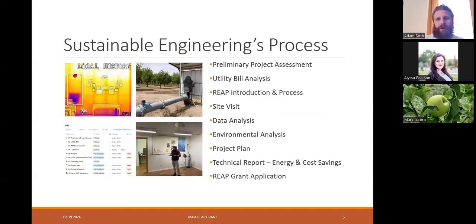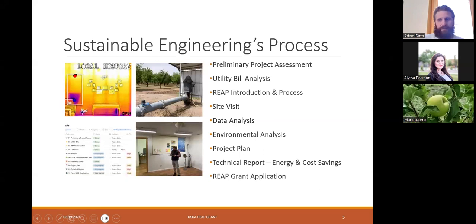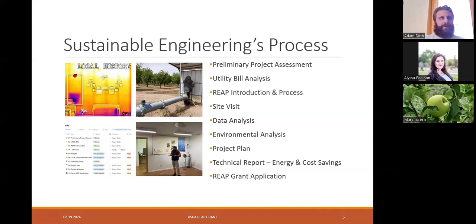We're going over our process and what our services entail. We use a project management tool to keep things on track. Much of the information we covered today will be included in the preliminary project assessment and REAP introduction and process task. We will request your utility data to get a high-level understanding of how much energy you're using and the potential cost savings you can expect. We will then schedule a site visit — depending on the size of your facility or operation, this could take between a half day to one or two days.